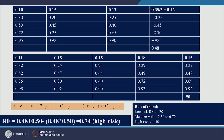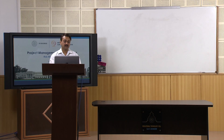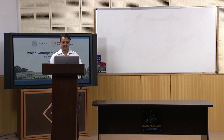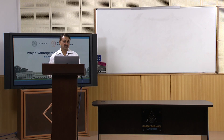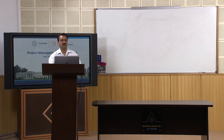In this way you can assign probabilities — but who will assign them? This is an important point. You need to talk to experts. Experts will tell you, for example, if maturity is very high, what would be the effect on cost? You talk to a group of experts to get those probabilities, and then you can easily calculate the risk factor.